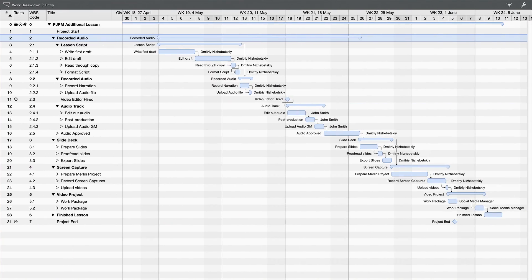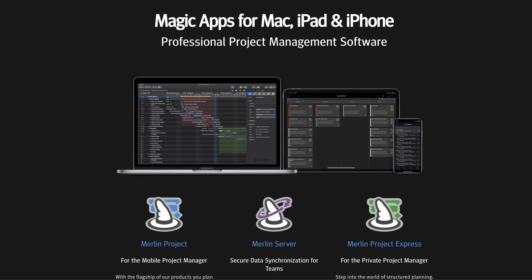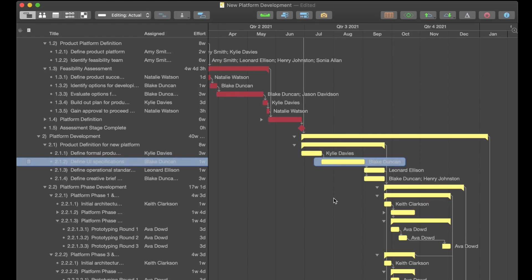First, we have lifecycle project management software. It allows you to plan the whole project from start to end. Usually you have a work breakdown structure on the left and a Gantt chart on the right. If you dig deeper into these apps, you'll notice you can create budgets, assign resources, and level their workload on tasks. The most popular names here are Microsoft Project, Merlin Project, OmniPlan, and SaaS solutions like Wrike.